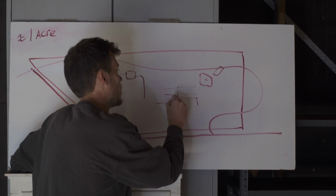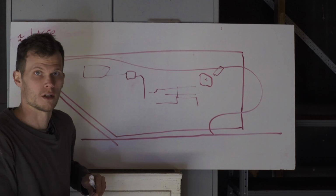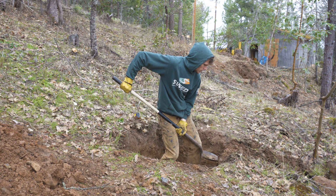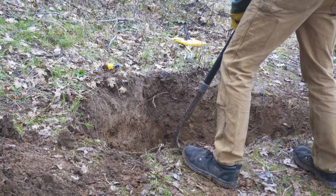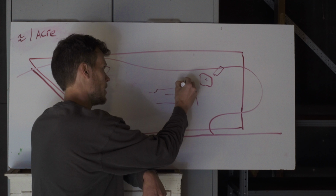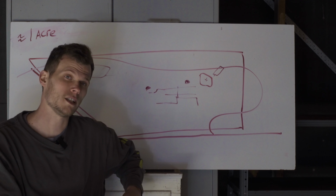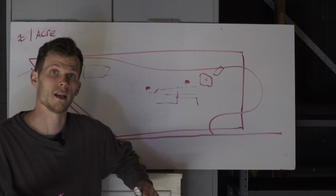and sort of zigzag through the trees below the garage here, which is where I was removing all of those stumps from. I spent Wednesday and some of Thursday digging 4.5 foot deep holes for the DEQ to come inspect to see what type of septic system we can put in. Those holes are right here. I don't know where the septic tank is going to go yet. Hopefully it can go below the elevation of the garage so that we can put a bathroom on this and make this an actual tiny home.